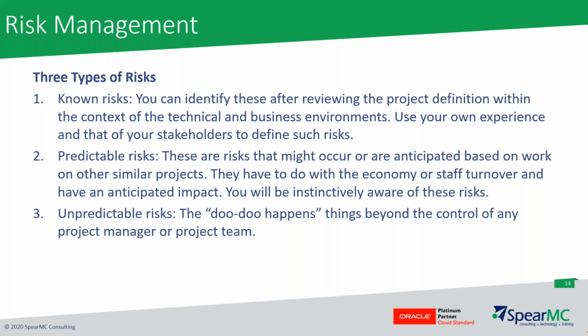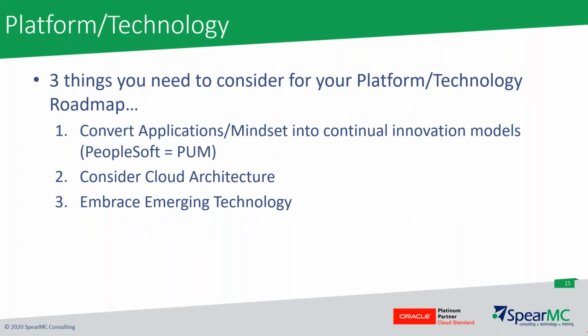And then unpredictable risks, things that are realized that weren't planned ahead. There was nothing foreseeable for these, but they are ultimately going to impact the timeline, the scope, resources of your project. So really important that you keep an eye on the risks related to your projects, because they'll get lost in emails, and then somebody will say, I told you last month that Bob and Sue were going on a 2-week vacation at Go Live. So important you don't lose sight of that. And again, as I mentioned earlier, you can even plug in that example with the 2 weeks of vacation for pivotal people, making sure you throw that in the roadmap as well if it's relative to your roadmap.